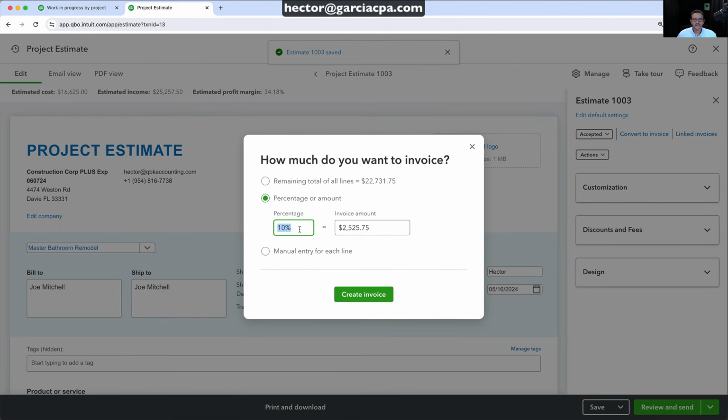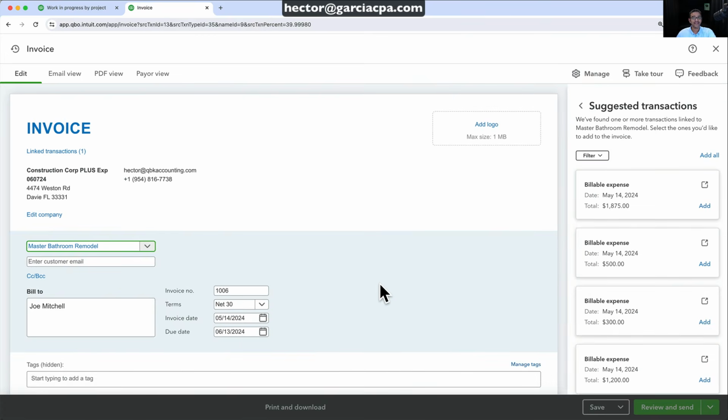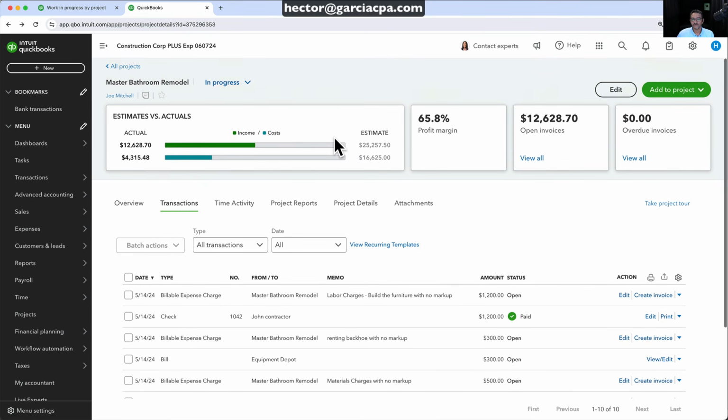and then essentially do a little bit more of the percentages. So let's say now I'm going to invoice 40%. So I'm going to invoice 10,000. Create invoice. Okay, remember, I haven't added any expenses. I've just done additional invoicing to this job. And again, most of these things are based on contractual points, right? On the project phases, or on specific accomplishments or deadlines, or contractual indications of where you can start invoicing. This is just a timing issue. This shouldn't affect your profitability.